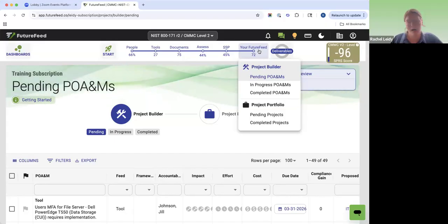The policy was that if you're doing POA&M management, you have to provide status updates at least monthly until remediation. So that's a lot of items to follow up on and make sure the work's getting done.